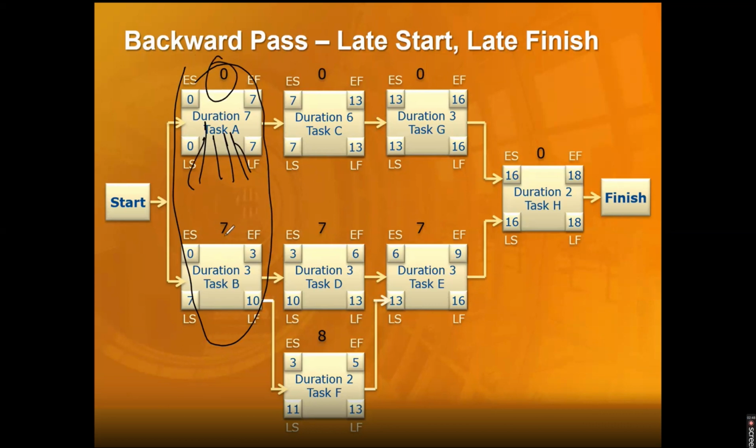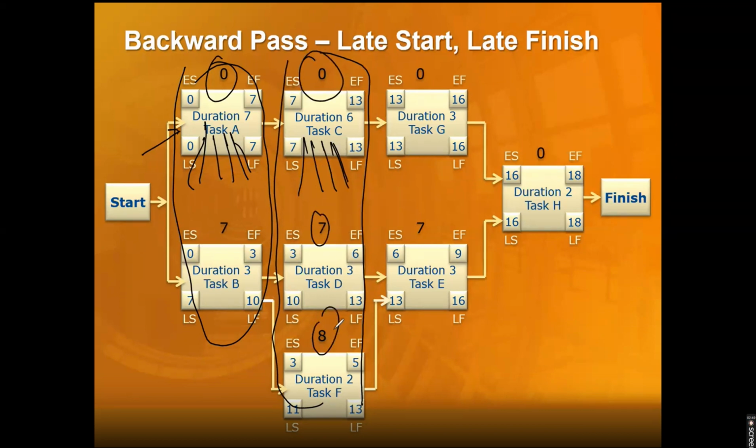This one can wait; it has 7 days of extra time. I can't let the critical one delay because it's a risk. Yes, it will delay my project. My scope, my baseline will get impacted. So first of all, I'll focus all on this one, and this other one can still wait. There's no hurry on it. While I'm prioritizing the next critical activity, I'll again put my resources here to finish it, because this is a critical activity and the other has still more extra time.